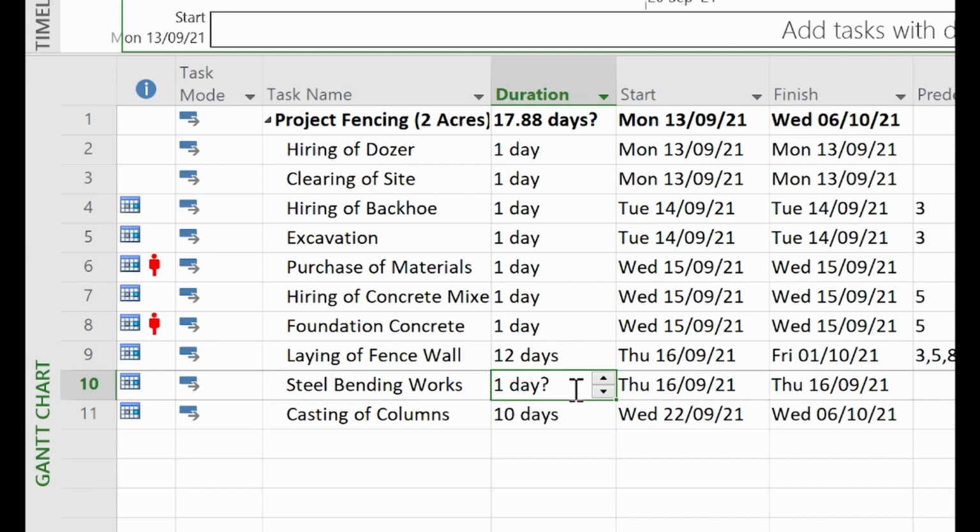Okay, so when would they finish? They will finish after the block laying, right? No, it can be before. So if block laying is taking how many days? 12 days. And this one we can give them, let's say, 10 days because it's many. And how many are we engaging? Still vendors, yeah. There should be 3, because we are doing over 200 and something pounds. So there should be 3 still vendors for 8 days or 10 days. So let me put 10 days here.